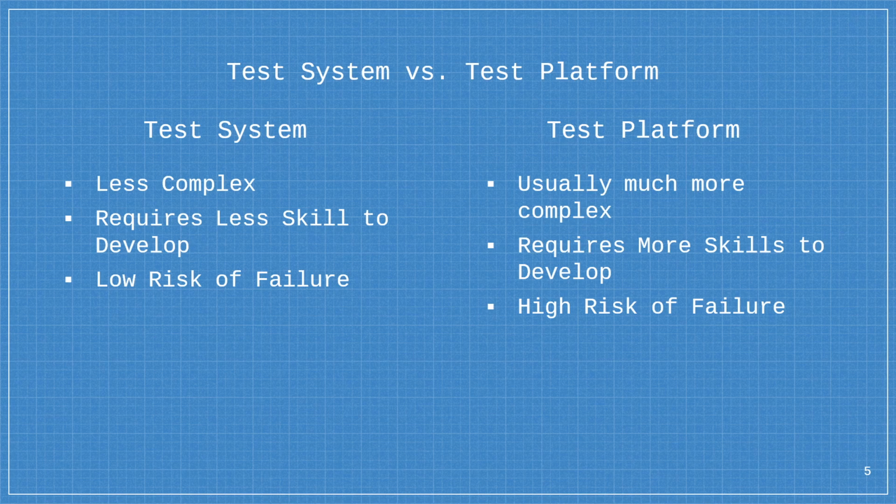One of the problems with test platforms is people want to go for what they call big bang delivery. So you go through a development cycle, and at the end you have this multi-purpose Swiss Army knife that will do everything for everybody. Never works that way. You need to divide it into smaller pieces of deliverables so that you're delivering something along the way that's valuable to the corporation. And sometimes you won't have your entire test platform spec'd out for years. It can take you years to get some of these things done, which doesn't mean you spend a couple years of development money and then start reaping the benefits. You can get concrete benefits from a test platform approach from day one if you structure your delivery cycle correctly.